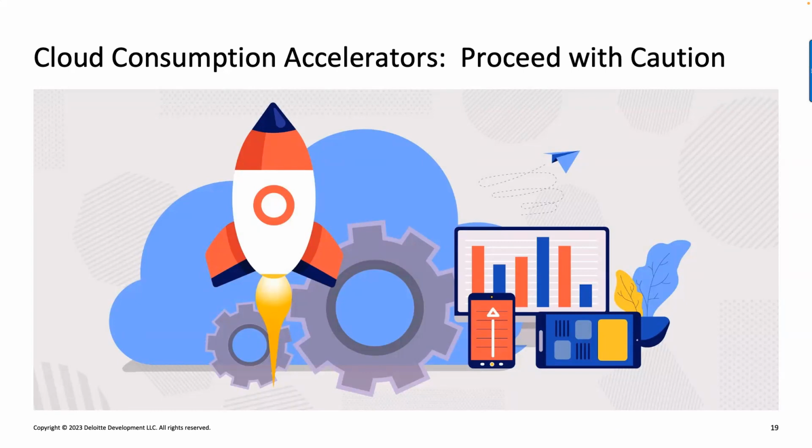On average, sometimes it takes like small retailers, we've done it for like the environment in 6 weeks. So there is something that can be done. We have accelerators that you can click of a button after a few design sessions and you spin out the whole environment, right? It can be done. You take another 2-3 weeks for every higher level environment, QA, pre-prod, and prod, and then you're good to go. But that's not the case with highly regulated type of industries.